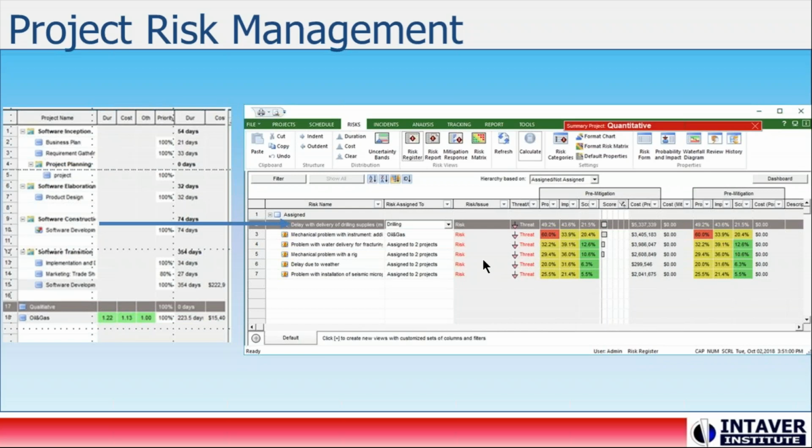If their impact gets too high, we can start to think about whether it's appropriate to be managing them at a project level, because it might be that they're just not manageable at a project level. There are certain risks that you see commonly in projects that aren't really project risks. They're organizational issues that need to be managed and accounted for in the projects, but the projects themselves are probably not the best place to manage them.